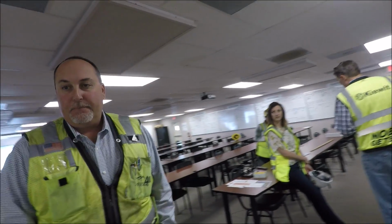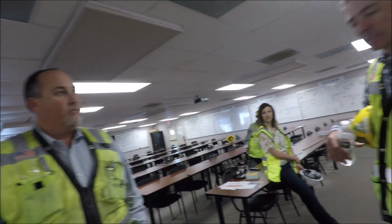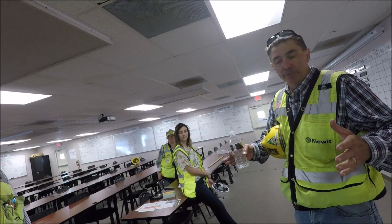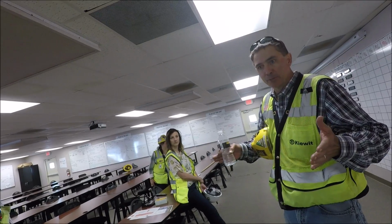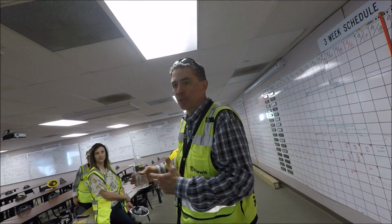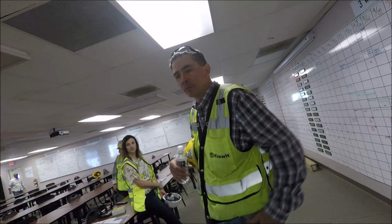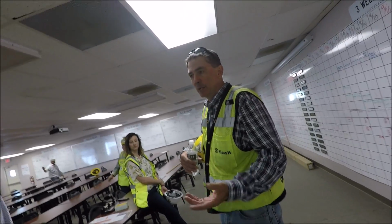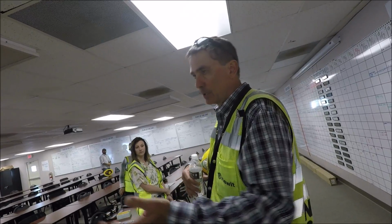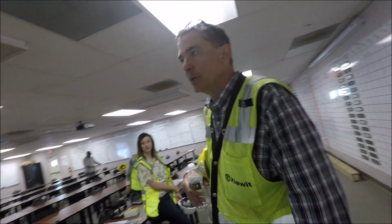And that's a whole discipline in itself, figuring out this scheduling, right? I mean, that's a full-time job for somebody. It works two ways. Schedulers will tell you the milestones that we have to make. This job's pretty simple: get done by November 1st. Then the discipline managers come in and say how long something's going to take, so you have to work back and forth to make it fit. Structure guys can't finish their work until the grading guys get their work done, so there's a lot of coordination amongst all the managers to achieve the schedule milestones.